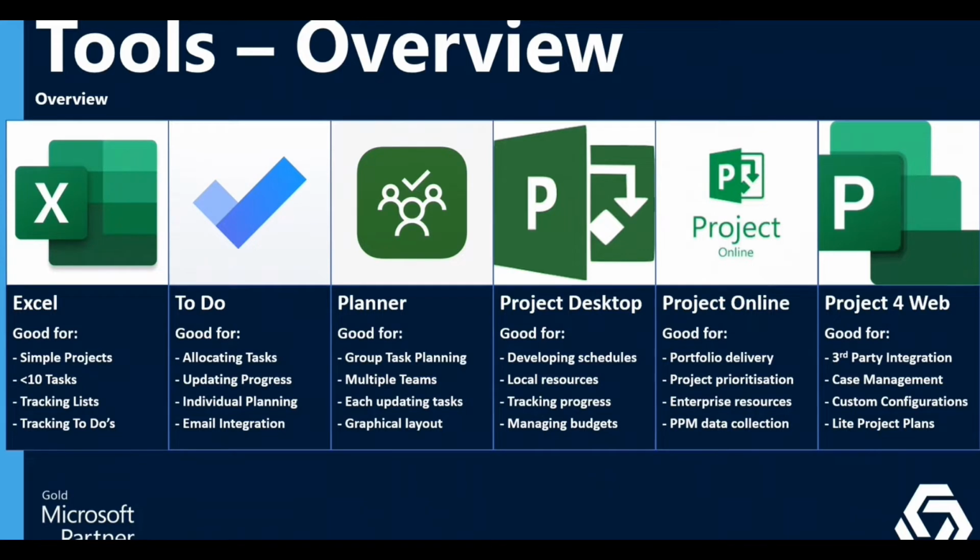So if you hit project.microsoft.com, you see Project for the Web. You can create a project. You can do some other cool things like upload a project desktop file into Project for the Web. So you can create a new project and you can do that, which is great. But it doesn't do things like baselining, for example. You can't baseline a project in Project for the Web yet, although there is a big roadmap and development activity coming.